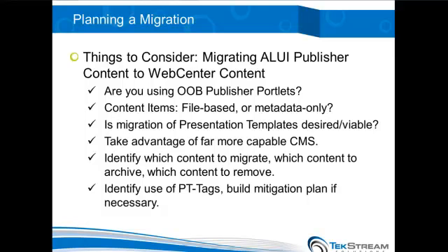Again, identify what content you want to migrate, what content you want to archive, and what you want to remove. So the difference is there, again, if you've been using the system for the last 10 years and you have 10 years of press releases out there, do you need to bring all 10 over? Or can you say, you know what, older than 7 years, I'm going to forget it, I'm just going to leave it, it's not going to be moved over.